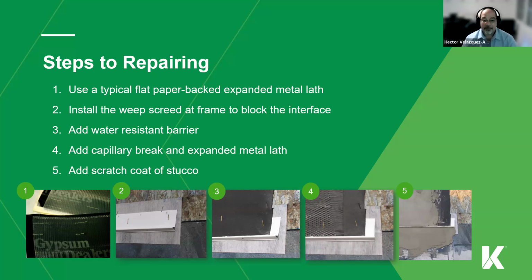And one last thing that happens way more than I wish it would: you get your SIRS, you get your reserve study. Perfect, you've got money to do the construction. Did you include your third party that's going to be there? Usually you do not. For some reason, you always say, oh, I've got $2 million to do the job. Okay, the contractor comes in at 1.9. Perfect. Now we have an engineer. That's going to cost us $100,000. Oh, I didn't account for that. I didn't have the money for that. Always add that section for your engineer. You need that third party. And yes, we are expensive. We are an expense to the association. So add that up in your numbers, because usually they're not there.